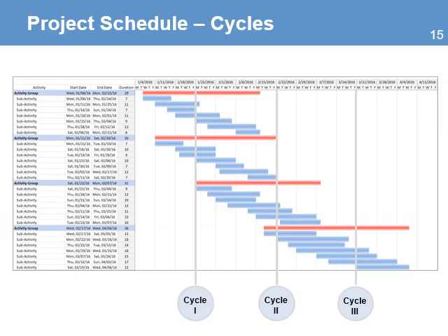When you develop the project schedule, you will need to identify the moments when you will start each cycle. It could be every month or every 2 months. On each cycle, you develop the detailed plans and use the lessons learned from the previous phase to make improvements and adapt your plans to the changing conditions. As a project manager, you should use this opportunity to review the original assumptions and make the appropriate changes to the plans, especially in the areas of scheduling, risk, and relationship with key stakeholders. This approach consists of a series of iterative cycles, allowing the project team to constantly evaluate the implementation and results obtained and obtain feedback from beneficiaries and other key stakeholders.